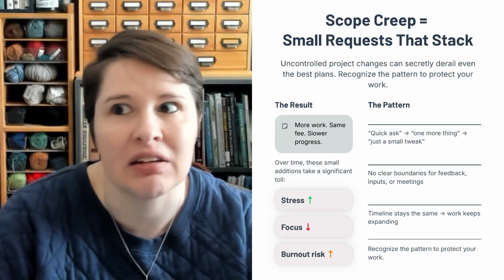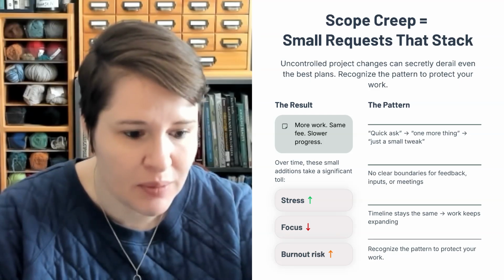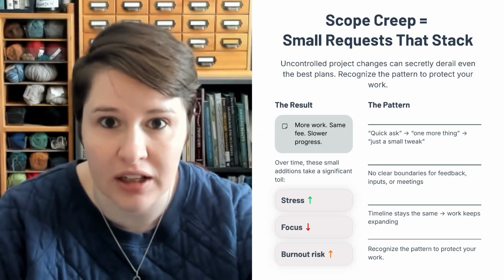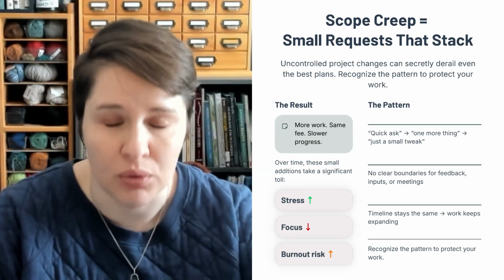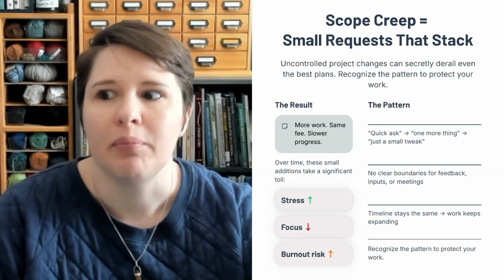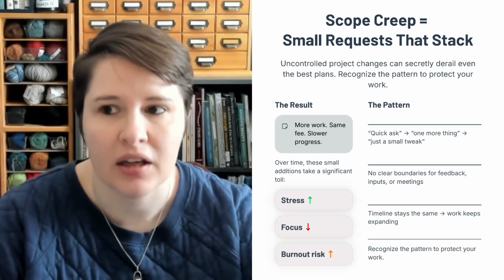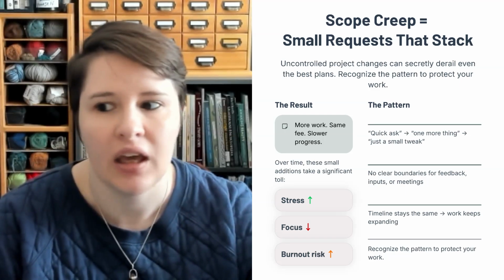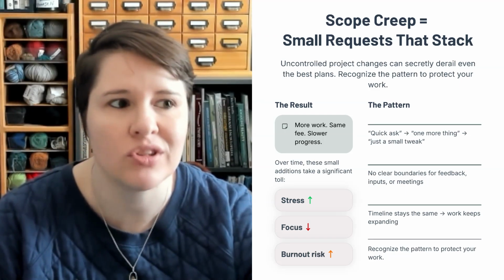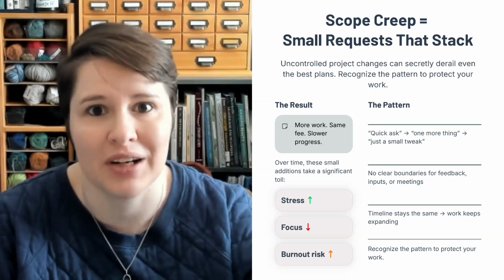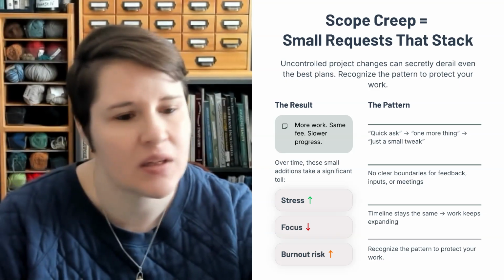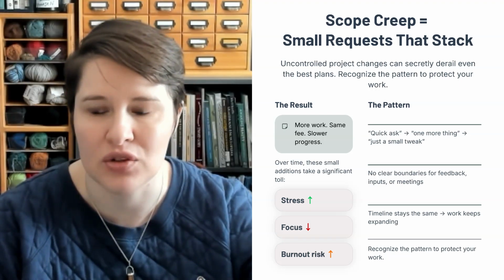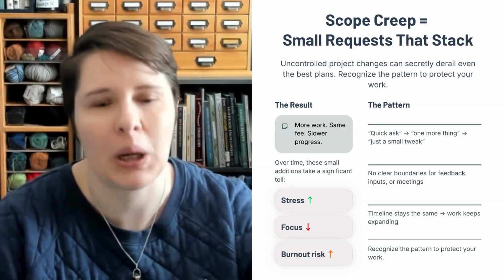Sometimes this means that you start out drafting a grant, but then it turns out that you have to do a whole program design consultation with the client in order to get to the point where you know what you're writing the grant for. Or maybe when you send out a draft for feedback, you end up with 6 different sets of feedback from 6 different stakeholders and no clear hierarchy on whose changes matter most as you're trying to reconcile all of them. Sometimes it means inputs arrive late, but the deadline doesn't actually move, so you're forced into rush mode without getting more compensation for it.